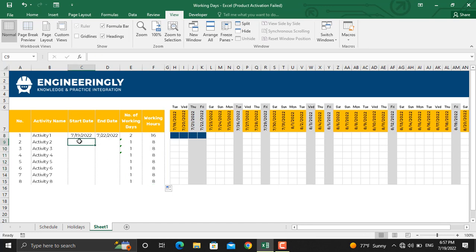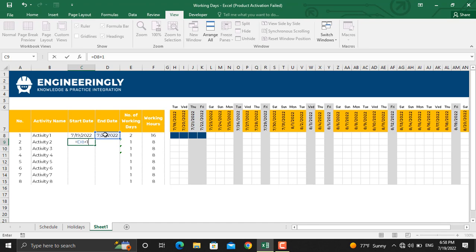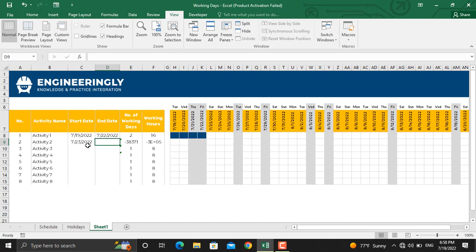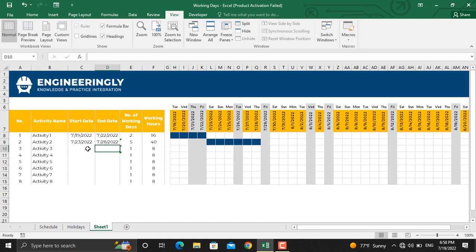So in here, I'll write down the start date as this date plus one day, so I'll write down equals sign, this date plus one. And the end date for this activity should be, for example, 28th of July, so I'll write down 7/28/2022. As you can see, I have only five working days available to get this activity done.